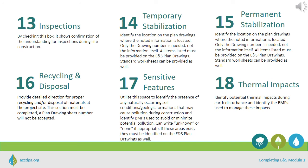By checking the box for Item 13, the applicant confirms they understand the requirements for frequent inspections during site construction, which is basically the life of the project. Unless the district receives a correct permit transferee form, the applicant will be held responsible for ensuring that inspections and maintenance take place during the entirety of the project. This begins after the pre-construction meeting when perimeter controls are installed, up until the project has been successfully completed and terminated. This box should be checked for all PAG02 submissions.